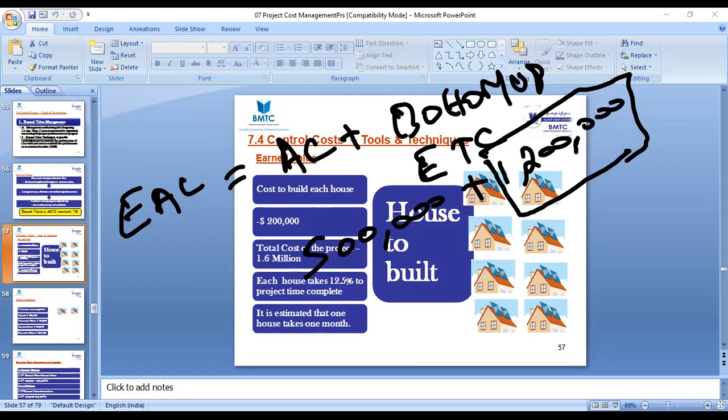So try to re-estimate using the bottom-up technique for the rework, for the remaining work. The money which you have to complete the remaining work, try to do the re-estimation using the bottom-up calculations. Since you don't have the estimation engineers, you need to bring an estimation engineer and he has to work for 3 months and you need to provide him a salary and an air ticket, visa charges, cab charges, food charges, room charges, every charge you're going to bear, and the charges will be $39,300. So where are you going to bring this money?